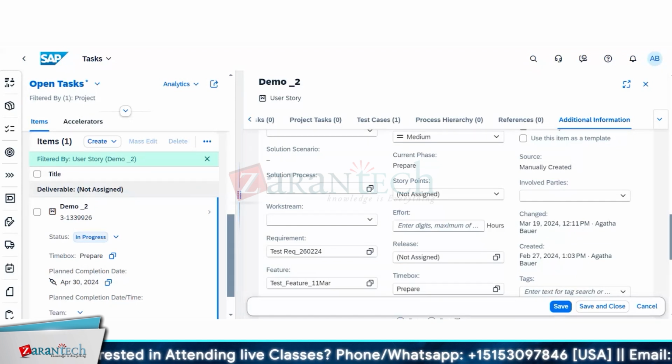Test case naming convention, test plans. How do you want to create your test plans? Do you want to create your test plans based on work streams or module-wise? Obviously, you will create test plans for your different testing iterations, for UAT, SAT, FUT. But apart from that, ideally you should have for one business process requirement, one test plan. So you can test that requirement as part of one test plan. Or if one test case suffices, then you can have one test case.